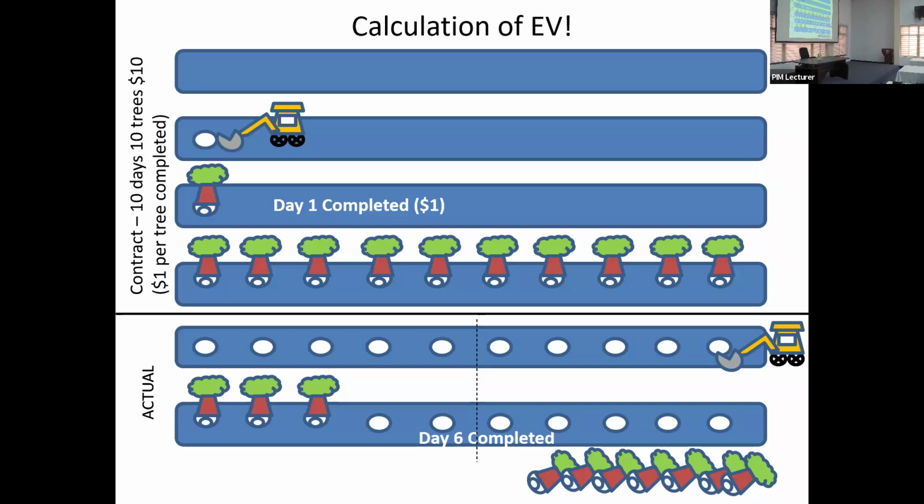Therefore, the site is worth. If I need $3 to complete the project, if I were to sell this site today, the site is worth $7. The site has incurred $7 worth of cost so far, because you have the trees, you have the holes, you have the XYZ worth. So I need $3 extra to finish the job.